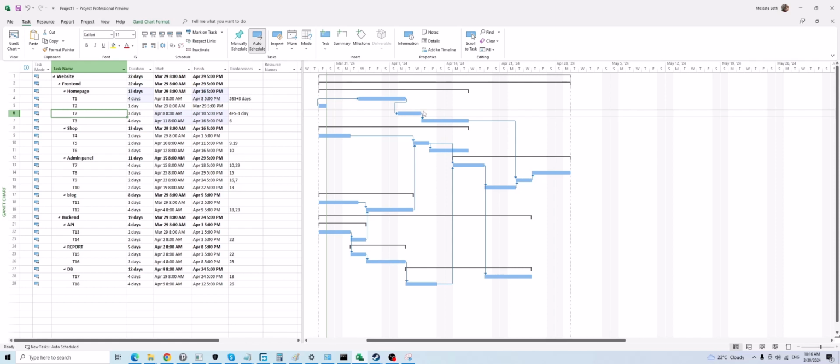But when you're done by filling the floor with the cement, then you cannot start the next activity immediately, because you need to wait 1 or 2 days. So the cement should be ready. Otherwise, you are going to mess the floor.